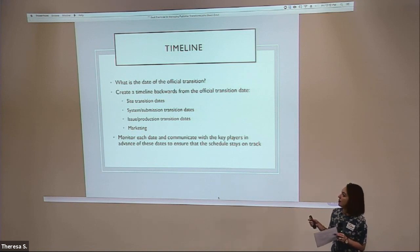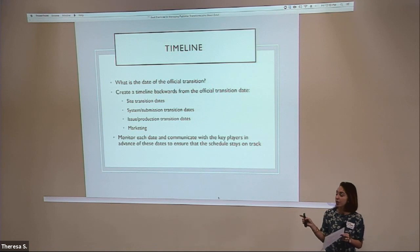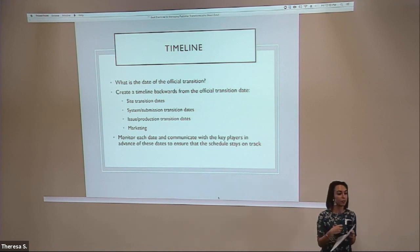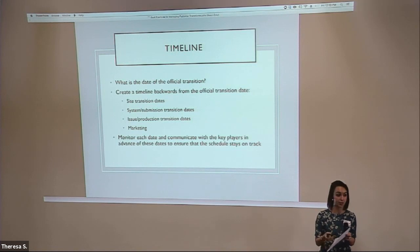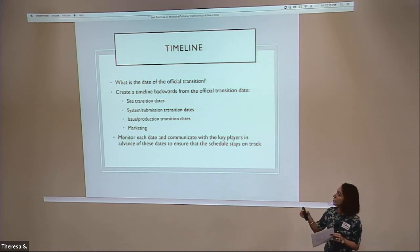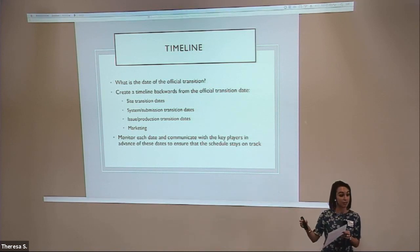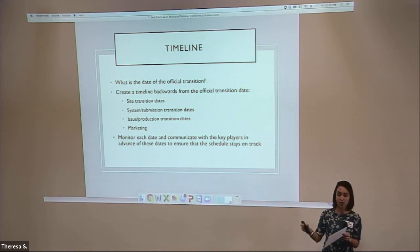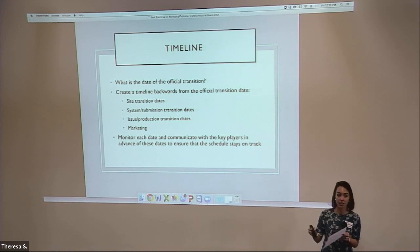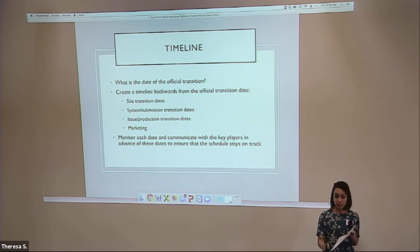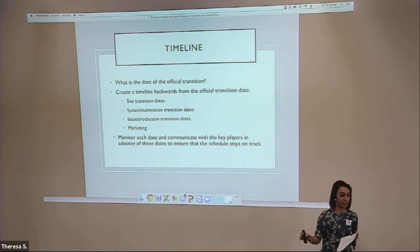At what point are you going to move archived issues and manuscripts from the old publisher to the new publisher? Your marketing dates can also be really important — at what point are you going to announce this to your readers and your society members? Make sure you give yourself enough time to accomplish all of these steps and get a concrete date for when each is going to happen and who's responsible for each step.